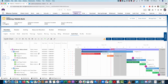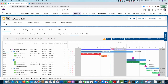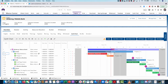One of the other things you can do is create dependencies on your Gantt chart — those predecessors. You're able to drag and drop from one action to another to create that relationship. It creates a finish-to-start dependency and will automatically snap the successor to fall in line immediately after the parent. That auto-rescheduling only happens if you have this lightning bolt turned on. If it's red, auto-scheduling is off; if it's green, rescheduling the parent will automatically move the child by the same period of time.